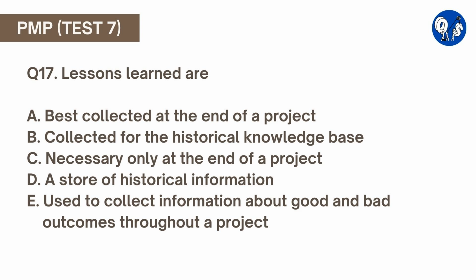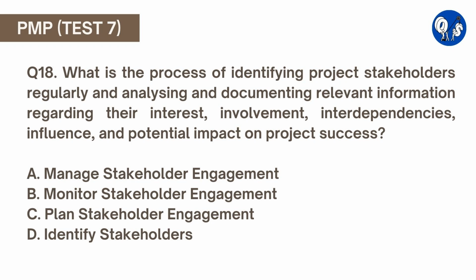Lessons learned are used to collect information pertaining to good and bad outcomes throughout project execution. If you look at the output sections of the PMI methodology, lessons learned are part of virtually all the execution processes.